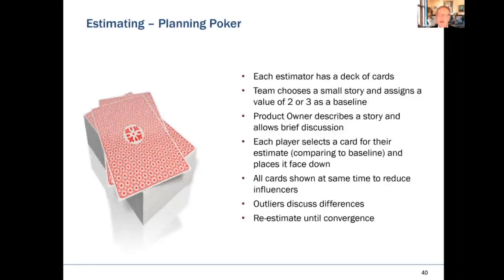All right, so now you may get lucky, and maybe the numbers are all 1s and 2s and 3s. Don't waste your time. Pick one of the numbers. Typically, they take the largest of the number, and they move on. Don't waste your time estimating. But you might have a situation where one team member says it's a 1, and another says it's a 13. Well, that's a wide difference.